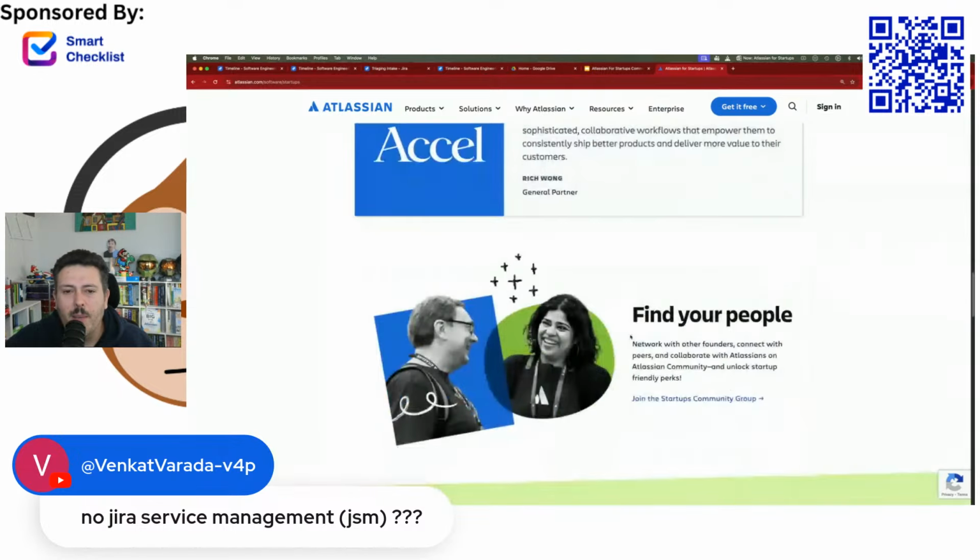Okay. So now that you know the ranking, this is one of the reasons why I like to do this. In one single location, I can organize and orchestrate the priorities of not just one team, but all of my teams. If I go to the timeline view, I can also link all of the due dates for everything, so we can start communicating expectations of when things should be completed inside of this plan view. And I can link the dependencies so that I can see if there's any conflicts.